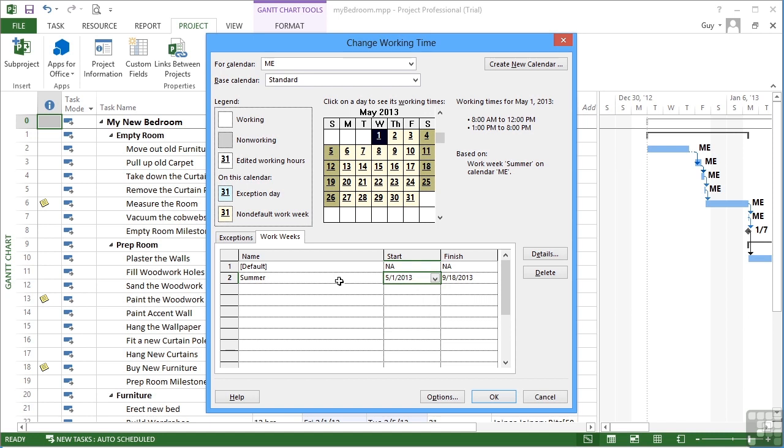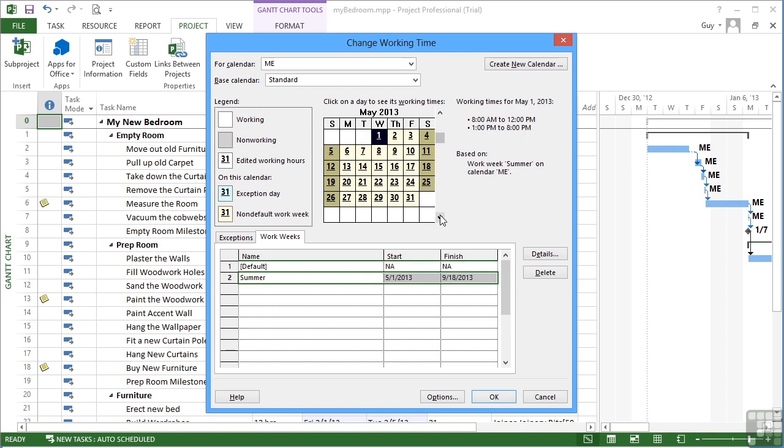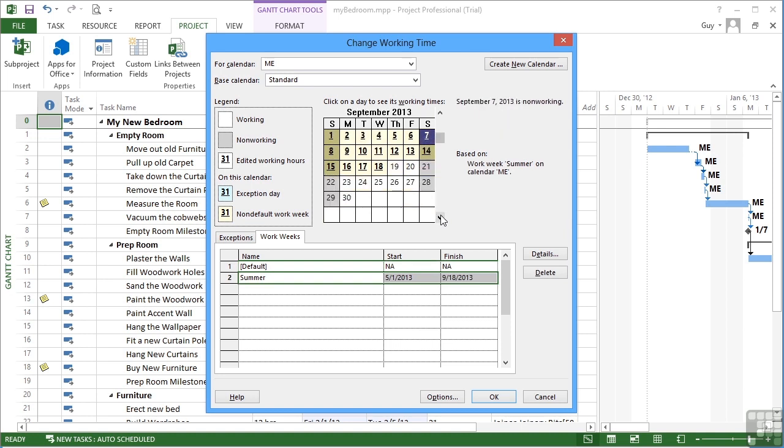When you look at the calendar up here, we can see that when we're in May, which is the summer, it's using the summer work week. If I come back to April, it goes back to the default work week. So May, I'm using the summer, August, and then September, you can see it defaults back on the 19th to the normal default work week.